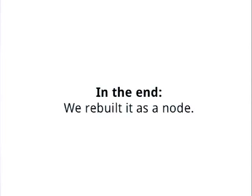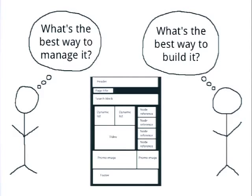We should be presenting them our plan and defending it before we build it, so that it's a lot easier to change things and change our minds. This was a small misunderstanding and in the end we fixed it, but it was another example of how we were just thinking different things. We were thinking how to build it; they were thinking what's the best way to manage it. We just didn't consider how our approach was going to affect them.